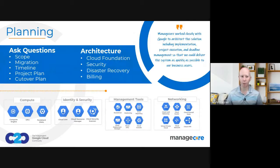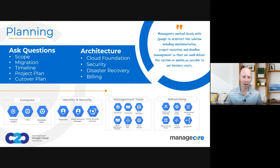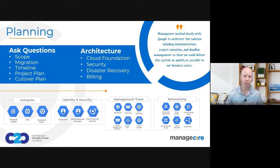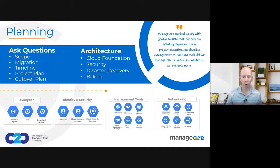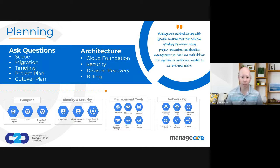When we talk about planning for a cloud migration project, planning comes in a lot of different forms. First, we want to ask questions — who, what, where, when, how. Who's going to do the work, what teams need to be involved. We want to assess the scope: which systems need to move into the cloud, are there dependencies between servers and applications, will applications in Google Cloud connect back to on-premises servers, and will you be replicating your corporate DNS or Active Directory into Google Cloud? What regions and zones do you want to deploy in?